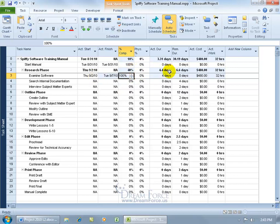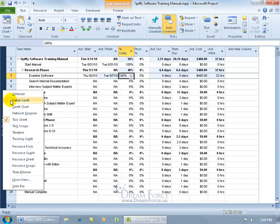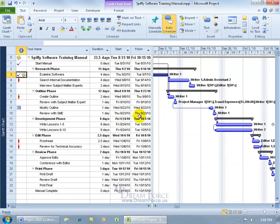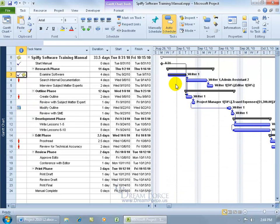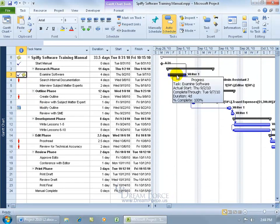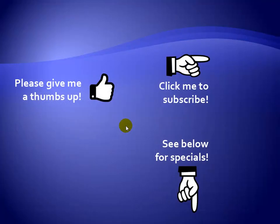And then not to leave you hanging until a couple of training videos later, but when you start marking these complete here, over in the Gantt chart, if you come over here and right click on the view bar and go to the Gantt chart, and let me scroll over, you can see the progress line for the task. When the black line goes all the way through, it's at 100% complete. You can see in the pop-up down below, it says 100% complete. Thanks for watching.